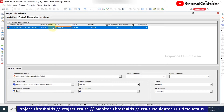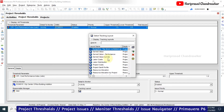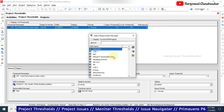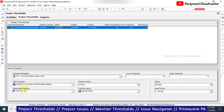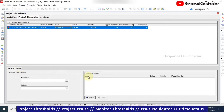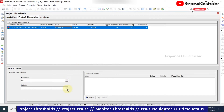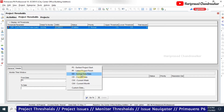If you want to add a tracking layout for reference - which we set up when doing earned value analysis - you can put that here. We can also assign a responsible manager: for example, I'll put GM Civil as the person who is going to take care of this threshold monitor. Then go to Detail where you can select the date range - for example, project yearly start and earliest data date.